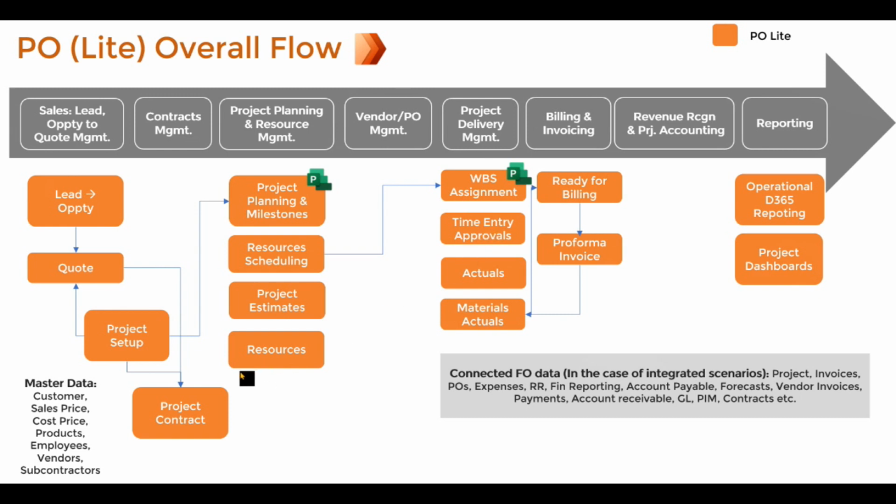Once you win the project, a project manager takes over the project. He refines it further and starts managing that project. So he approves the time entries, he approves the expenses, all those things, and he plans further. He breaks down the tasks further, and finally keeps generating the invoice, and he sends the invoice to the customer.